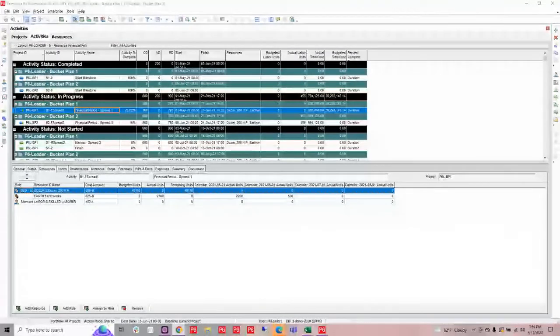So another one of our clients, as an example, had a list of projects that they got from Excel, because they were doing all their project management in Excel, but they wanted to create all those projects in P6. And we had a special template with standard WBS formats, and we made hundreds of projects in less than 10 minutes with the standard WBS. Okay, so all sorts of examples that we can give you on how quick these things can be.